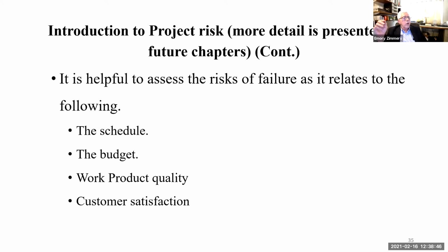Let's take the student housing that's across the street from Moeller Lab, the South Side Commons. Does anybody live in that building? It's student housing right on the corner. I watched that building go up. We were in person at that time. In that construction project, what are some risks with the schedule? I'm going to give you a clue here. It was built during the wintertime part of it. Snow, ice, weather, yeah. That can really hit your scheduling on the construction.